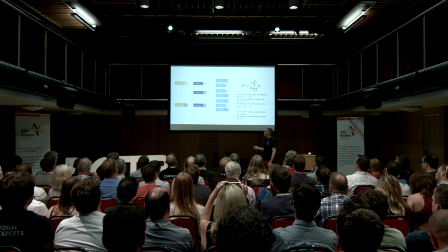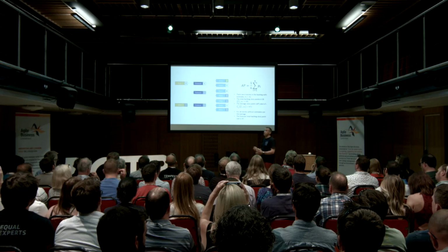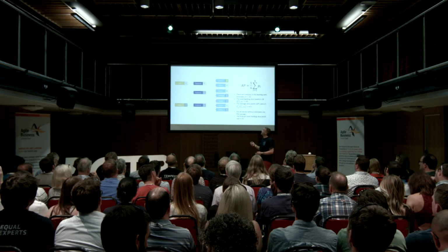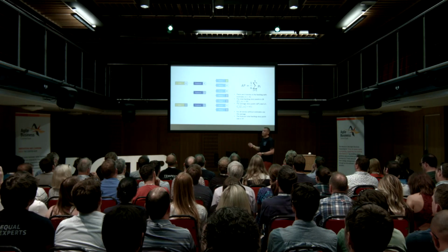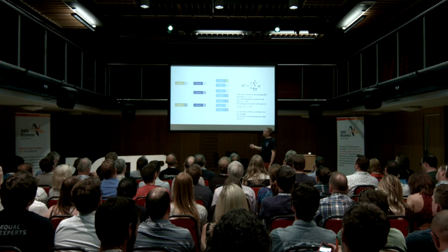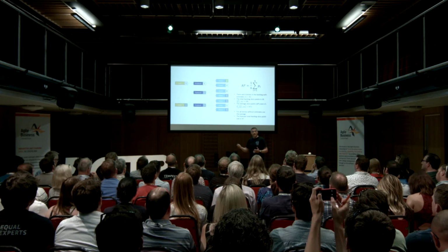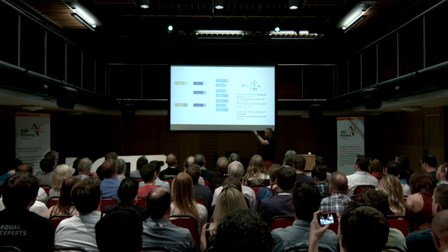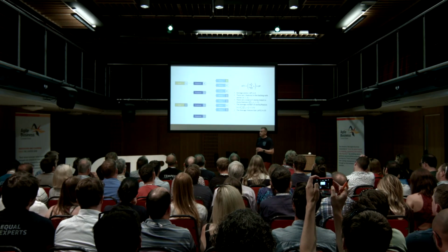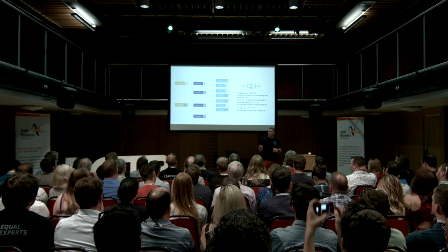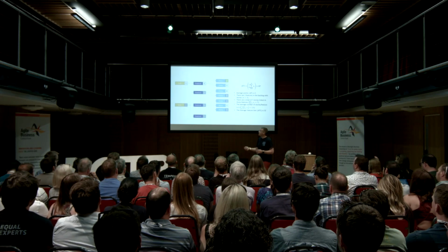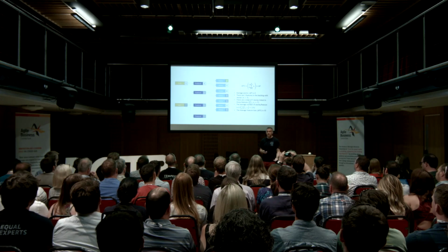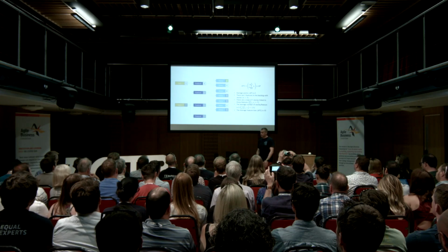And then when we start talking about these features here, it gets a little bit less clear because there are some unknowns in here. So we can predict that this feature is 13 and this feature is 15, and then we can say this epic is 28-ish. Once we've got our backlog structured like this, when we start looking at perhaps this second epic down here, we might be looking at breaking it up, and we realise there's a new feature that we haven't thought about before.